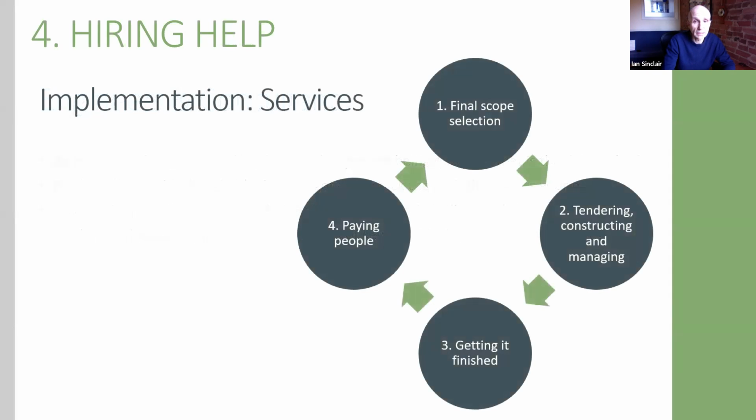So then on the service side, we're now moving forward with a construction project. So that construction project needs managing. The first thing you obviously have to do is, you may have started with an energy audit with 10 line items, and you may wish to take out that slice and that slice, in which case, do you understand what the financial and technical impact of removing certain things is going to be? Now, we're not going to proceed with the exterior insulation. It's just way too long a payback. Well, it's going to completely ruin all the calculations for your heating and cooling retrofits.